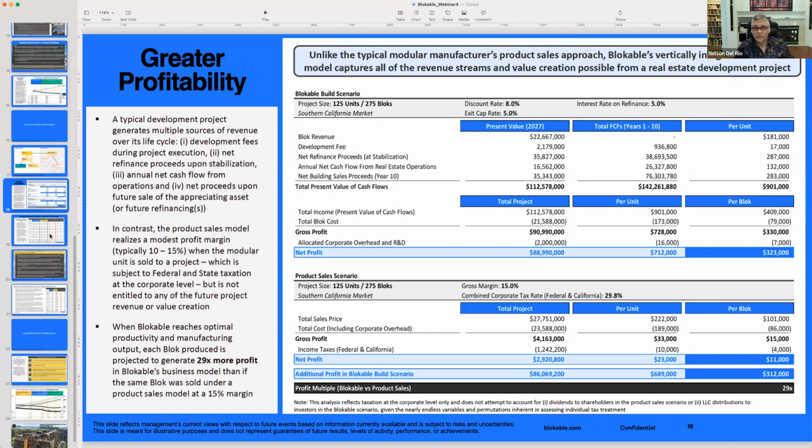And the nature of modular is that a developer goes out and works on designing something in pre-development with architects and engineers, and then they mass it. The contractor will look at aligning themselves with a modular person if they're going to plan on using modular, but they won't sign a contract for it because they do not have the money for it. They don't have the plans for it. And if they sign a contract to take it as a certainty, that means they're going to get sued if they don't close the deal. So that will never happen.